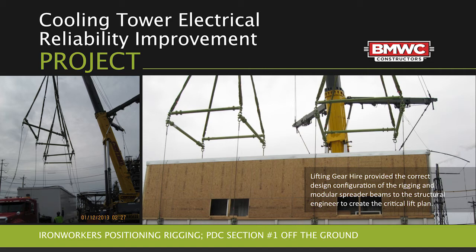I think one thing that you mentioned to me in talking is that schedule was key with these modules coming in, right? If there was any delays, when would have been the next opportunity for you to set these modules? It probably wouldn't have been for several months. Your PDCs are the nucleus of the whole project itself. They have to be set before any of the electrical work can continue, and the piping work can continue, as well as these have to be in place. The project is at a stall at this point until these are set.